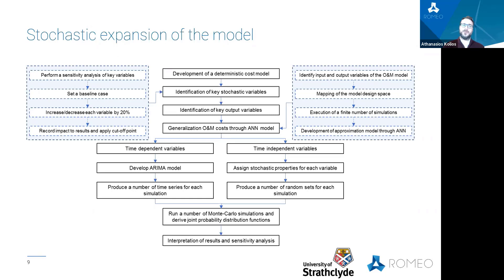Following this logic and adopting a Monte Carlo simulations approach, the terminology migrates from the conventional deterministic inputs to deterministic outputs approach, to accepting a series of statistical distributions as inputs which result in an expression of selected KPIs as a joint probability density function. As a result, the outcomes are expressed as values with an associated confidence level.